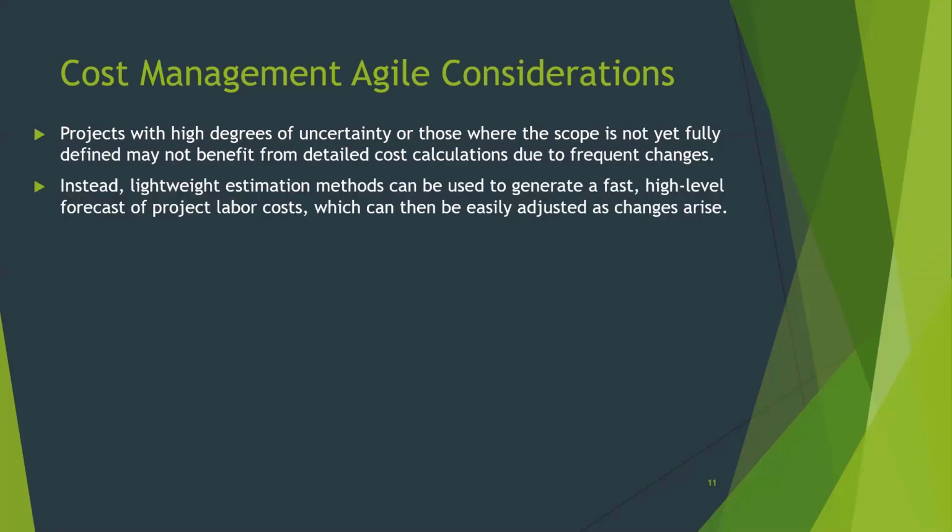Instead of more detailed estimation methods that might be used up front to estimate how long it's going to take to deliver the different requirements, there are more lightweight estimation methods that are used when it comes to managing a project. I mentioned earlier a point-based estimation technique. Your team won't try to do this for every single requirement like they would maybe on a waterfall project, but within each sprint and the sprint planning session comes to estimating agile work effort.